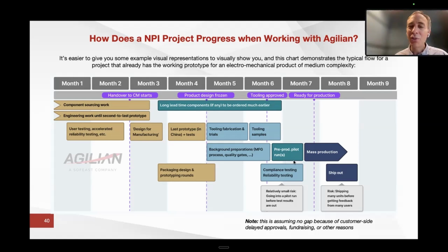Here I budgeted only about 1 month. And this also, about 2 months for the tooling phase, is okay usually for products with relatively low complexity. In some cases, it has to be longer. All this needs to be adjusted to the real case, obviously.